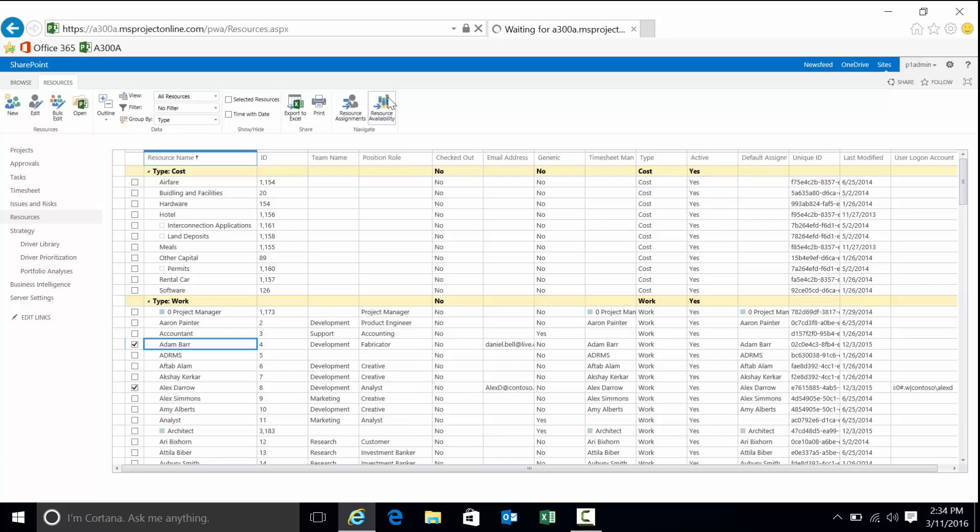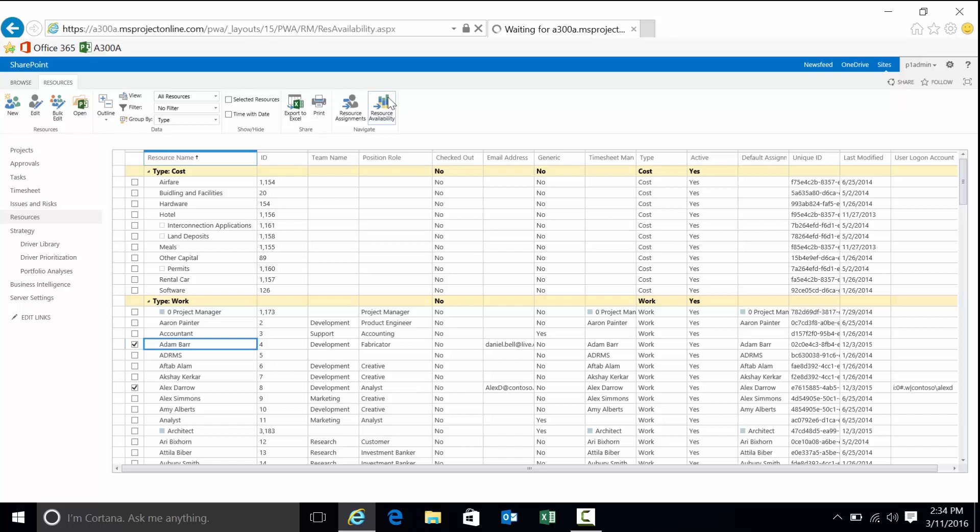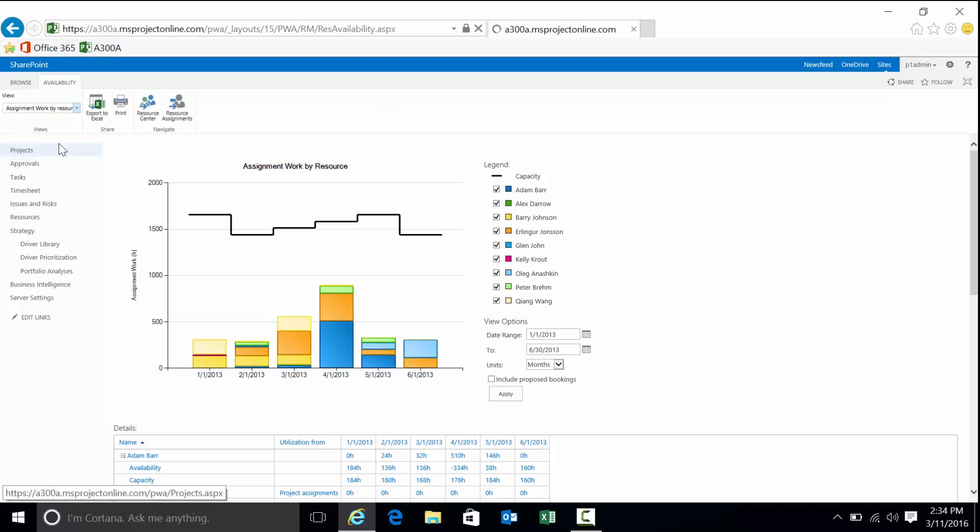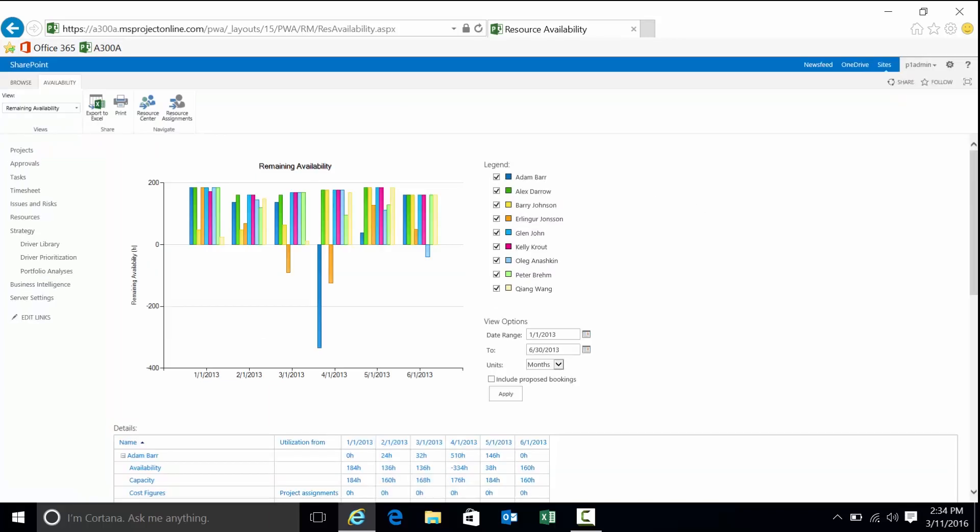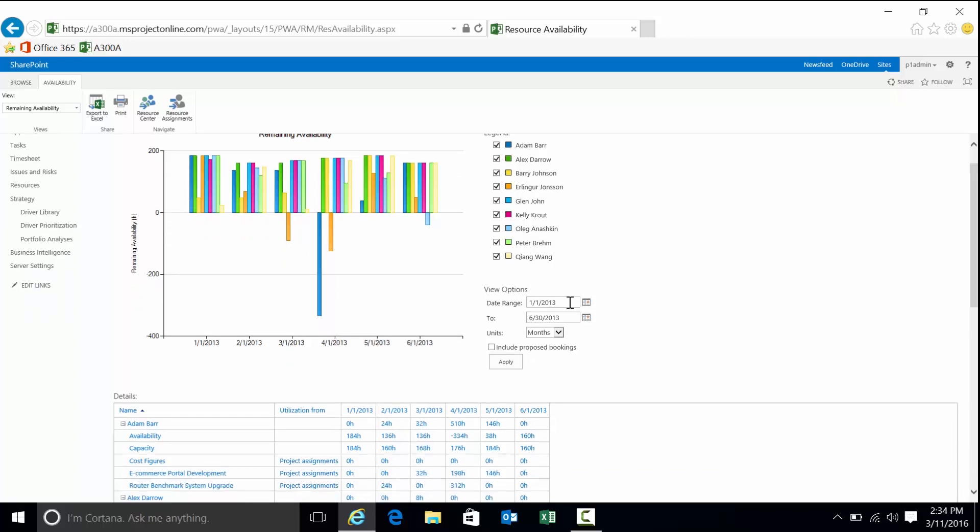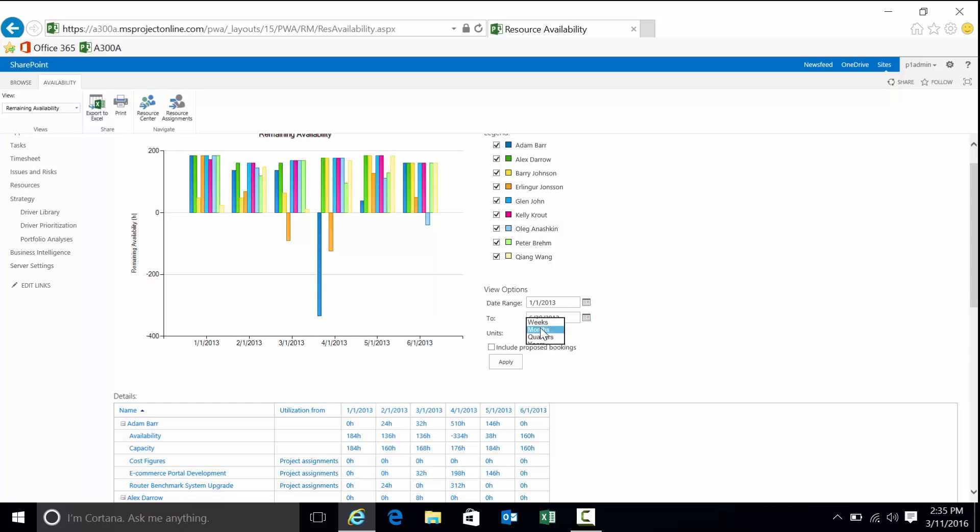There's several different ways to look at the information in this next view. Typically, I always switch to what's called a remaining availability view because I really find that personally to be the easiest type of view to read the information. If you look at this drop down list, you'll see the different types of views. Each resource has a calendar associated with that resource that states how many hours per day, how many days per week they can work. Based on that, taking into consideration the time period and the number of months. We're looking at increments of months. I could be looking at anywhere from days to years.